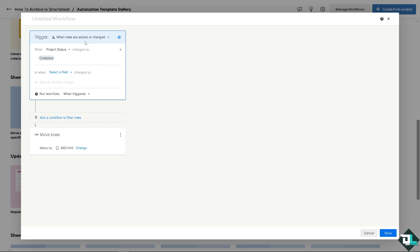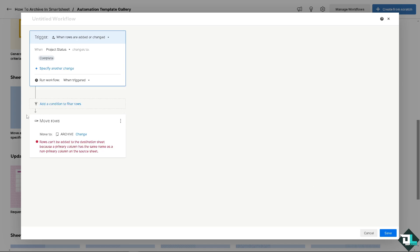So when a project status has been completed, the row is automatically moved to the archive folder. That's another way to archive in Smartsheet. Although it's not traditional, these are the workarounds to compartmentalize your files. Once you're done, click Save.